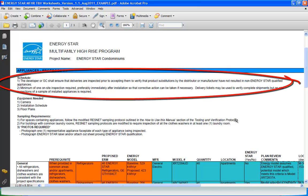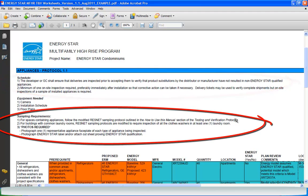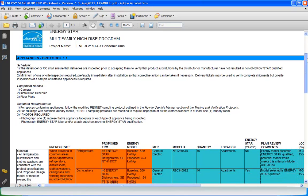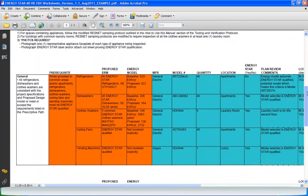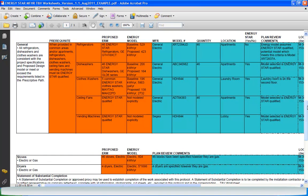The Schedule section gives recommendations about the appropriate time to begin inspecting that particular component and sometimes suggests the minimum number of inspections. Sampling Requirements outlines appropriate sampling rates, minimum sample set requirements, and mandatory photographs to be included as documentation. They also list measures and building components to be inspected, as well as mandatory requirements and/or energy modeling assumptions to be confirmed.